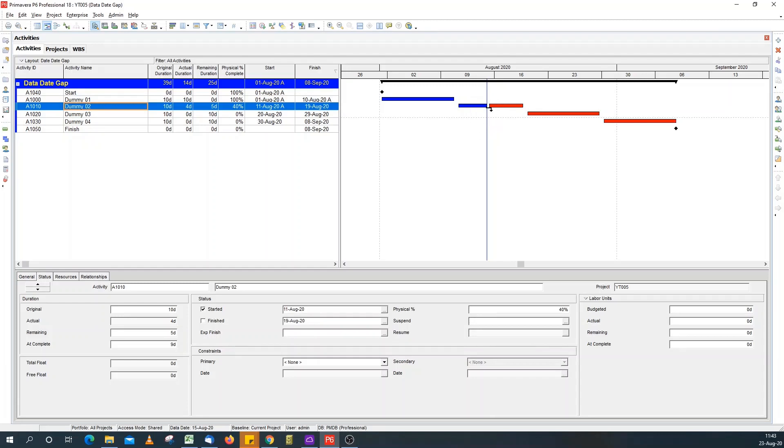This gap normally appears when the activity calendar is not 24 hours a day. If the calendar were 24 hours a day and you have a gap, it's usually out of sequence logic.